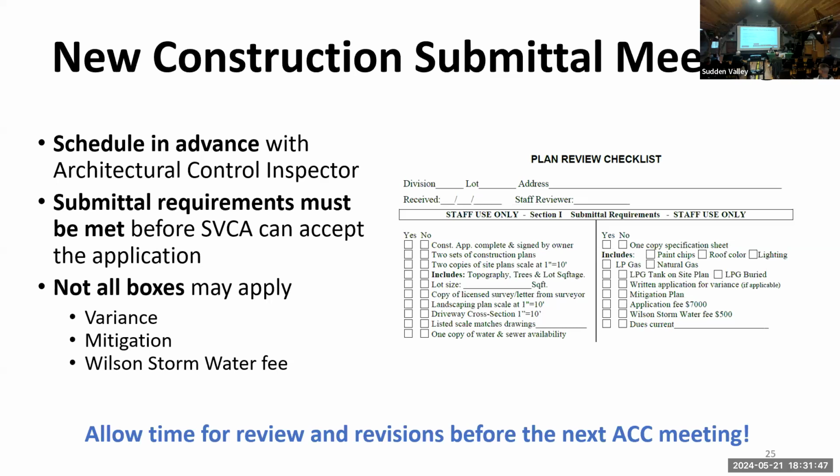So the first meeting we go on is a submittal meeting. I recommend reaching out via email, but this does have to be a scheduled time to bring in your documents. Once you have your new construction application completed and you've checked all the boxes on that form, schedule a meeting. We'll decide on a time. You come in here and we will go through this plan review checklist to deem your application complete.